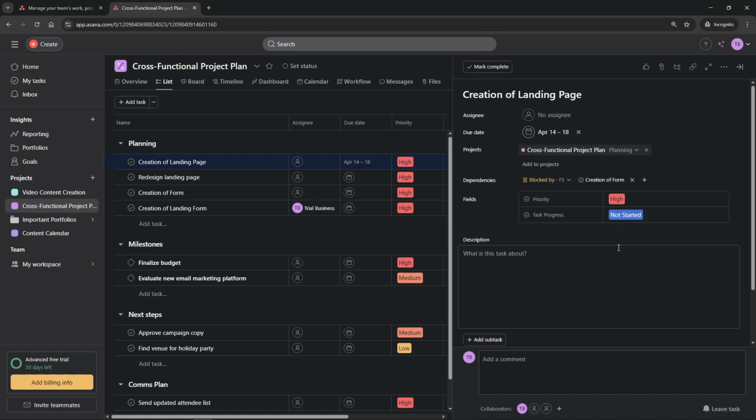After you've begun typing the task name, you'll notice a drop-down list appearing. This list provides suggestions based on the tasks you have within your project. Simply scroll through, find the task you need to set as a prerequisite, and select it. The final step is to confirm your selection. Once you've chosen your task from the drop-down menu, you're done.